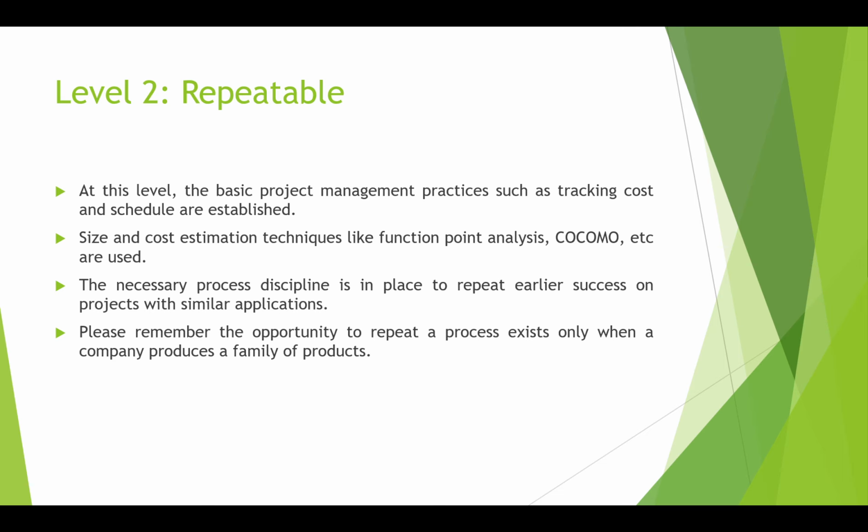So tools like COCOMO, in another video we'll find a detailed explanation of how the COCOMO model works. It is used to estimate the cost of the model, how much it will cost. The full form is COCOMO, Constructive Cost Model. So tools like COCOMO or function point analysis are introduced to estimate project size and cost. The key feature here is that successful results can be repeated, but only for similar types of projects.